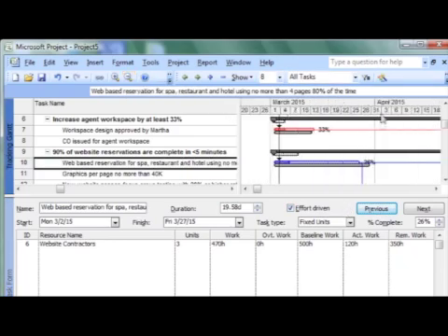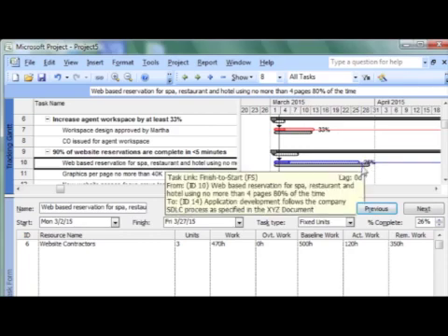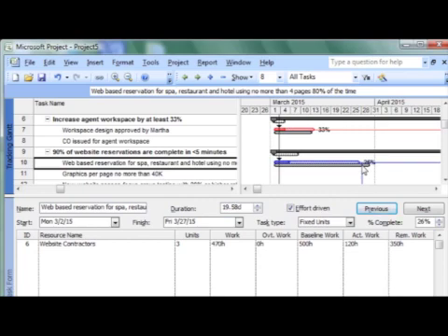So as you saw, I zoomed it in just a little bit right here, and as you can see, the blue bar and the gray bar are no longer right on top of each other. The blue bar is just a little bit shorter, which reflects their new shorter work estimate, which is also showing that that task right now is forecasted to complete just a little bit early.